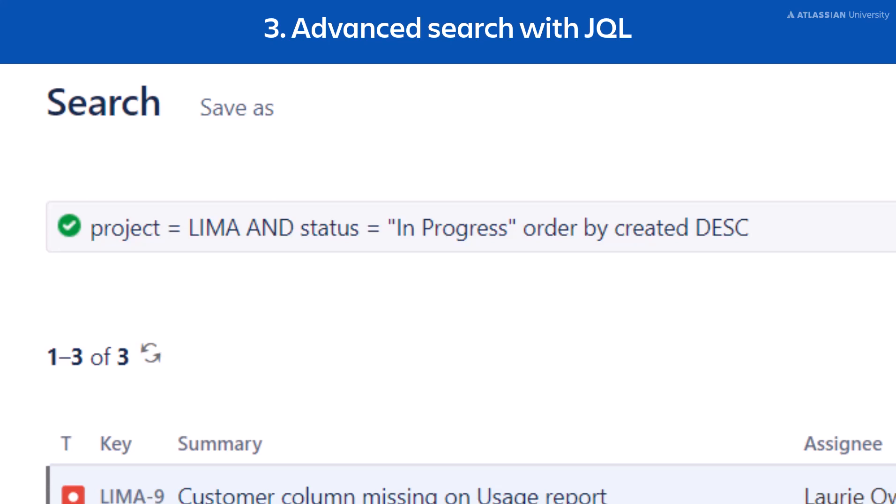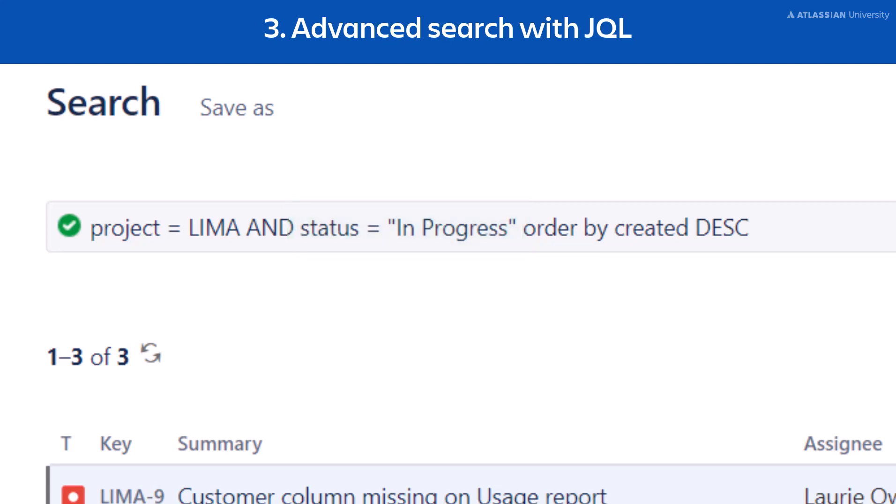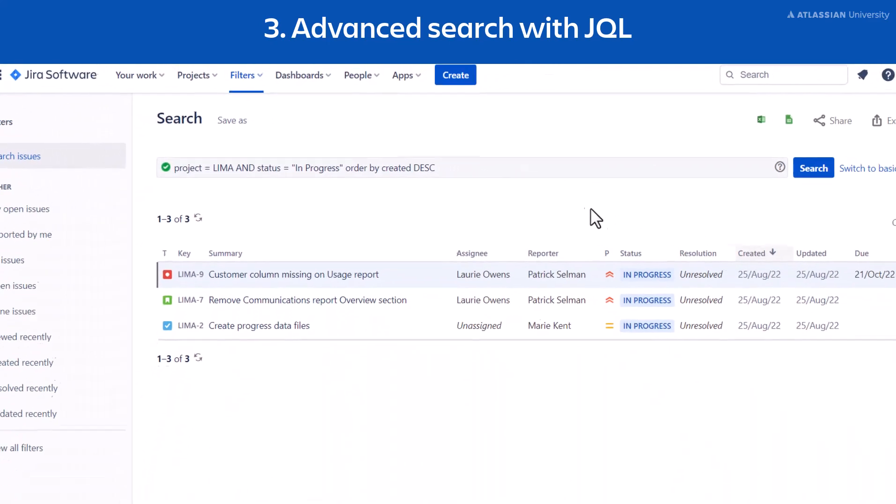For this example, the query displays issues in the Lima project that have a status of In Progress. It also orders the list of issues by the date they were created in descending order. This is just one kind of query. There are thousands you can write for complex searches using JQL.